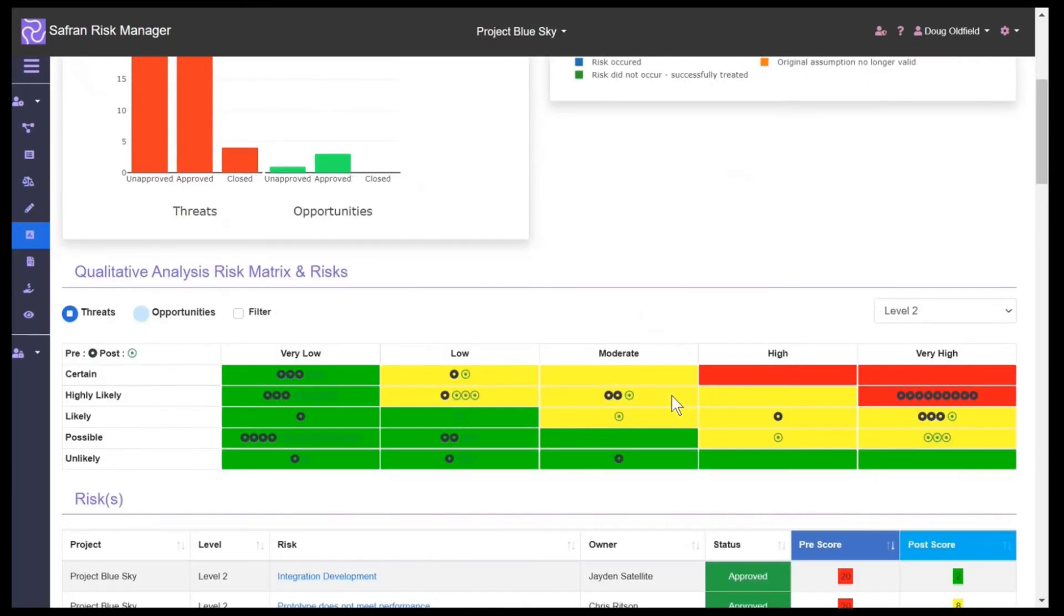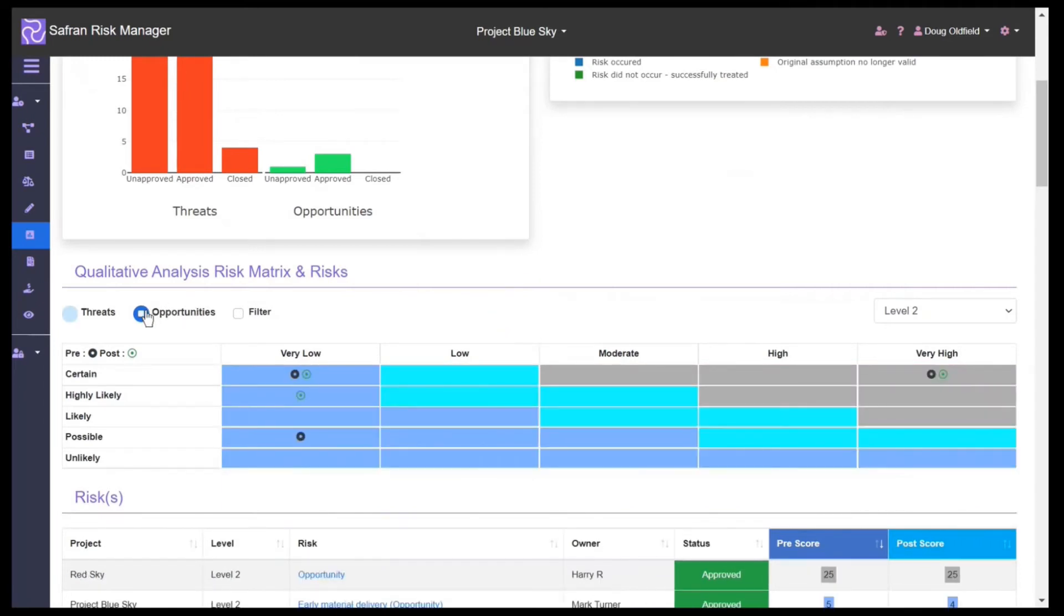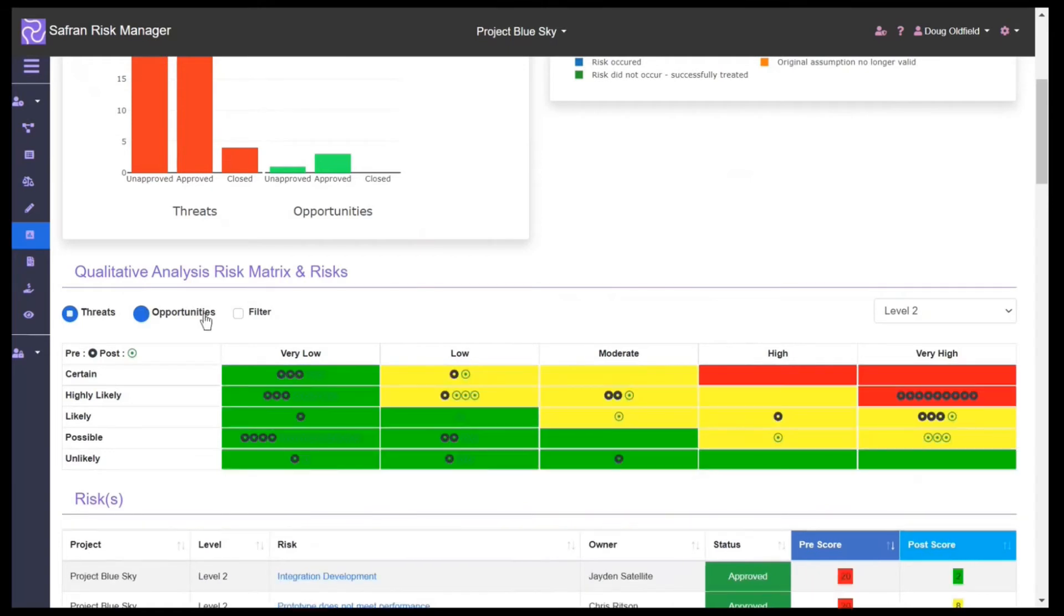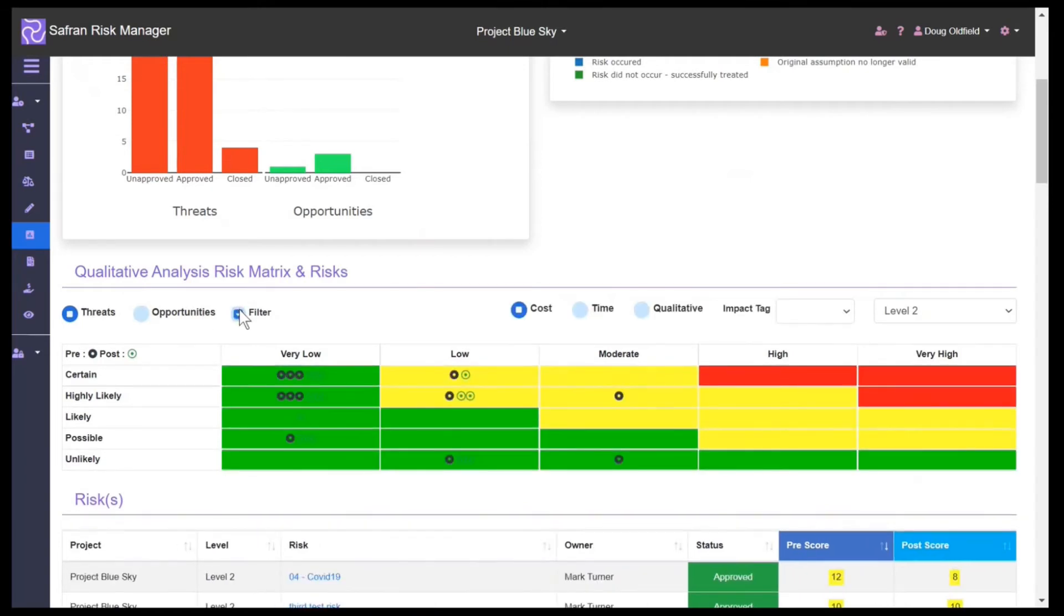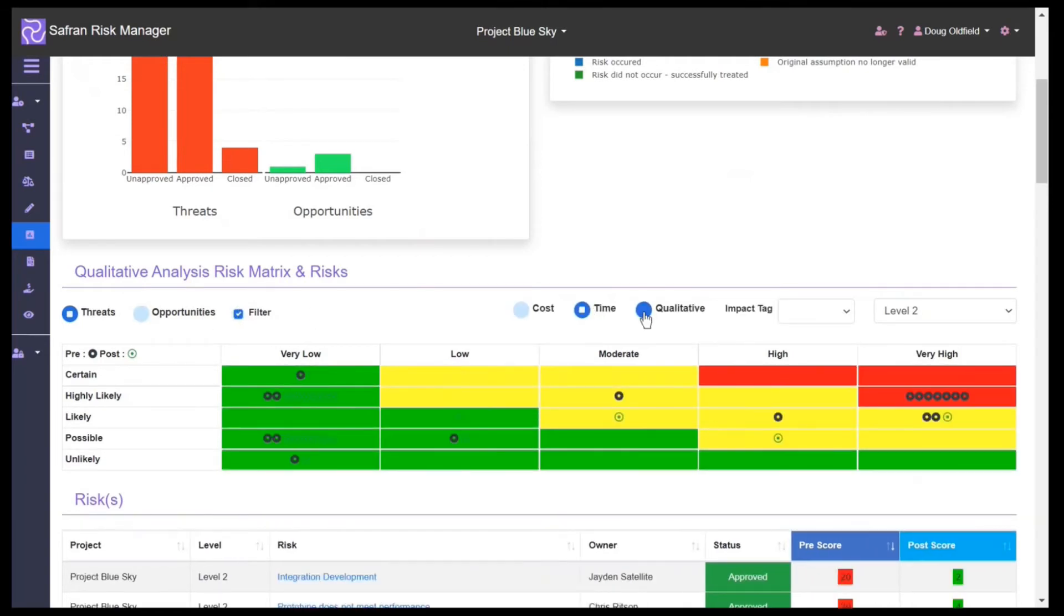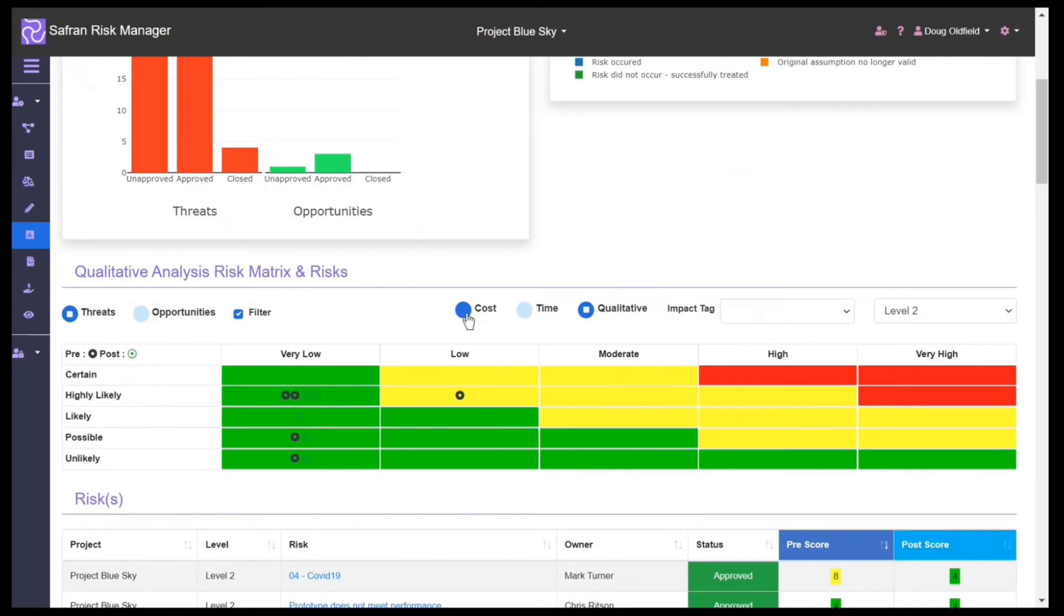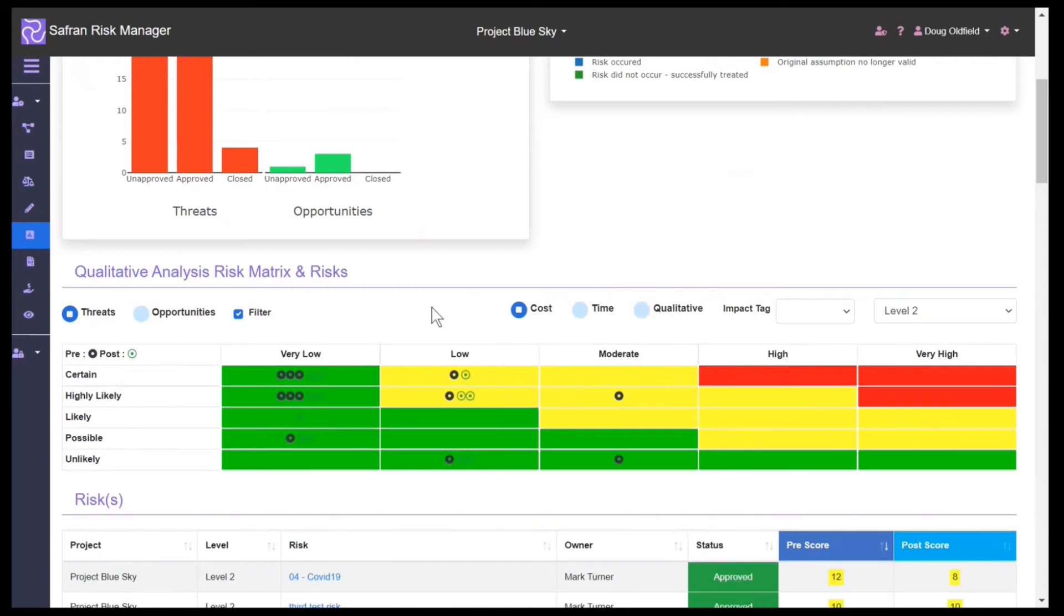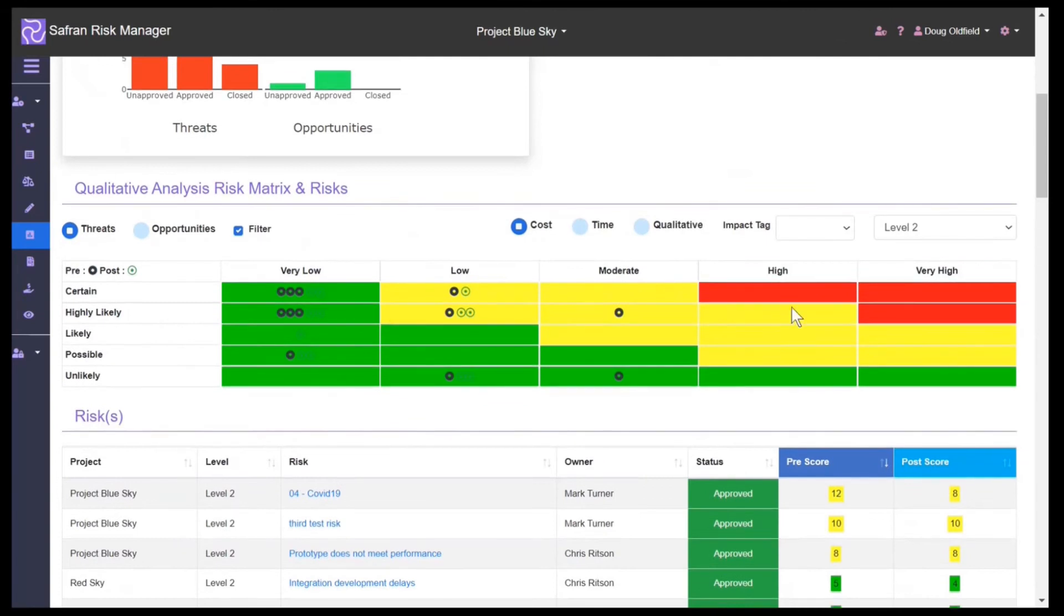We have here the heat map which shows us our different threats at different levels. We can also look at our opportunities and the filter which shows the different risk impacts, and we can see how we're performing against cost and time on a pre or post-mitigated basis.